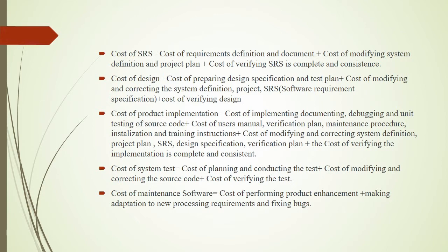The cost of design is equal to cost of preparing design specification and test plan plus cost of modifying and correcting the system definition, project, SRS plus cost of verifying design.